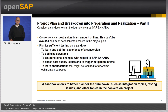Conversions can cost a significant amount of time that cannot be avoided. There are must-do activities that need to be executed, and all of this must be considered with realistic planning. An appropriate way to plan for this is a sandbox approach — it is the right way to assess the unknown in terms of timing, but also corrections and mitigation activities that need to be considered. A sandbox should be built up as realistically as possible, ideally based on a copy of production.